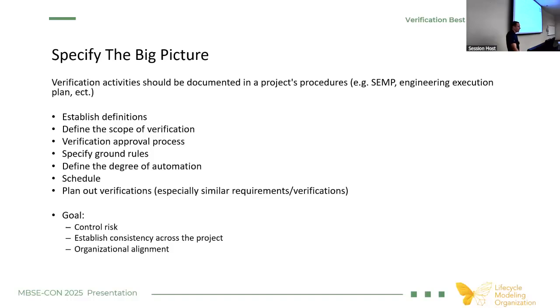The mindset that's coming from the customer is they will only close things when everything's built, when everything's tested, when everything's done. Depending on the level of the requirement, if it says that you need to use a certain color insulation on a cable, do you really need to wait for it to be built and tested in order to say that you're good in that regard? I think the answer is no. You can probably burn down that risk earlier on.